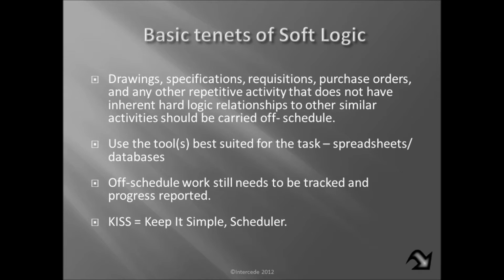So now with pipe, there is a certain sequence. You want to put the large bore in before you put the small bore, and if you have any HVAC duct or something like that, it should probably go in first too. Essentially large to small, and you want to have a point of departure or termination. So you don't generally install the middle without one of the ends. But beyond that, it doesn't really matter, especially if you were doing this in the pipe rack, what you would install. And the thing to keep in mind here is use the tool best suited for the task.